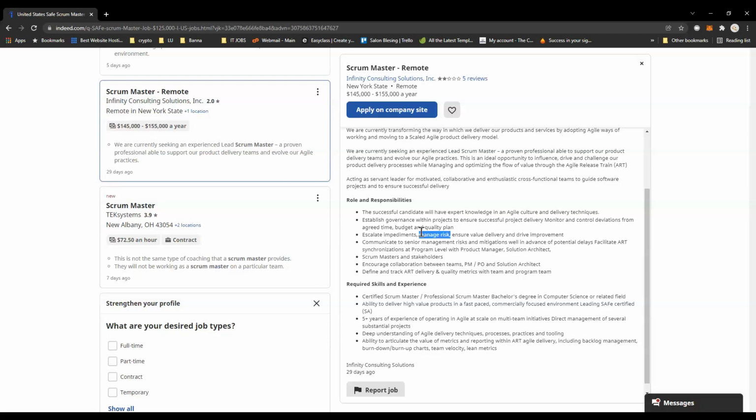So whatever you are doing as a developer, you have to stop and listen to the guide on how to fix that issue. That means it's a risk. Why is it a risk? Because it's going to delay you from completing your work on time. It can delay your team from completing your work on time. It can also break the system if you don't fix it on time. So that is something that you want to track very closely with your team.